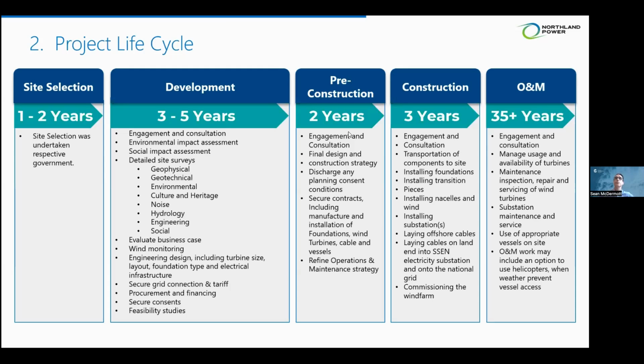Sometimes faster, sometimes slower, but to put that into context, I moved to Taiwan to work on our 1,022 megawatt Hai Long project. I moved to Taiwan in 2016. The project was already 1 year in development when I moved there. So it started in 2015. The project will not be fully commissioned until 2027. So that's 12 years to get that project from beginning to full operation.